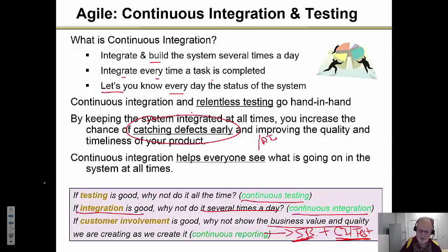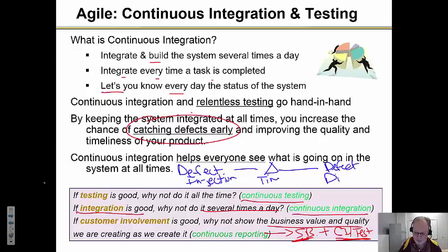Actually, you know how I like to scribble in the white spaces. Let me scribble in a larger white space. The time from defect injection to, all right, delta time from here to defect discovery. If you can take this and rate limit this towards 0, then you are greatly reducing the cost of rework, costs that other folks have done in dependency to something that you've done, all those kinds of things, and therefore you're going to improve the quality.